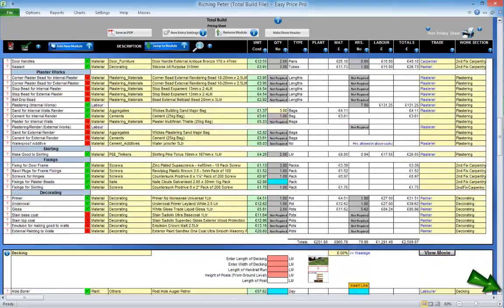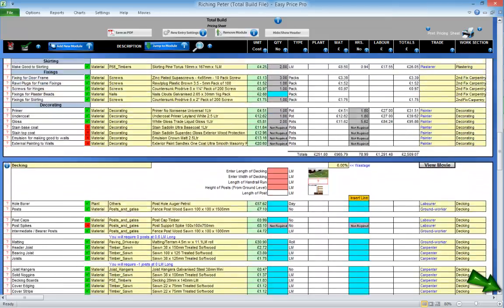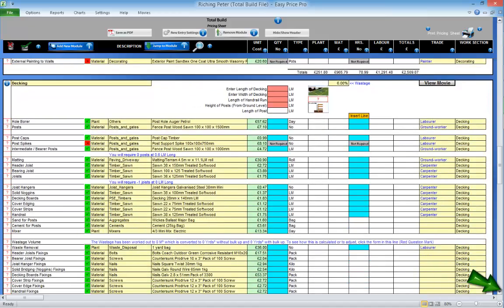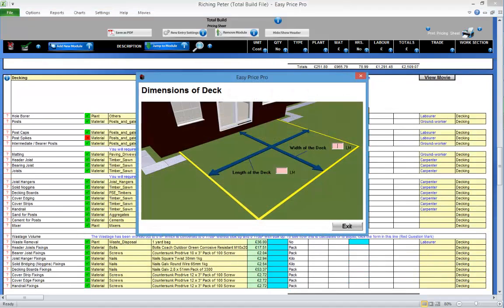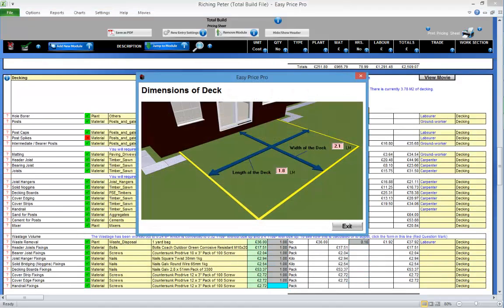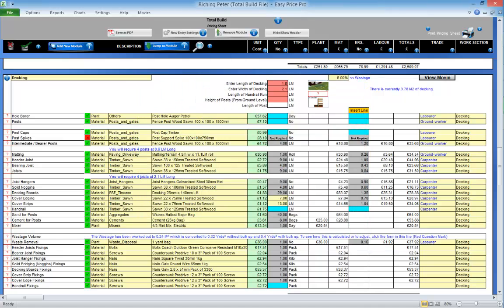Remember, these are the direct costs. No markups or VAT have been added. You will also have an option to add an additional line if an unusual item is required that isn't listed. Click the insert line button and add the details.